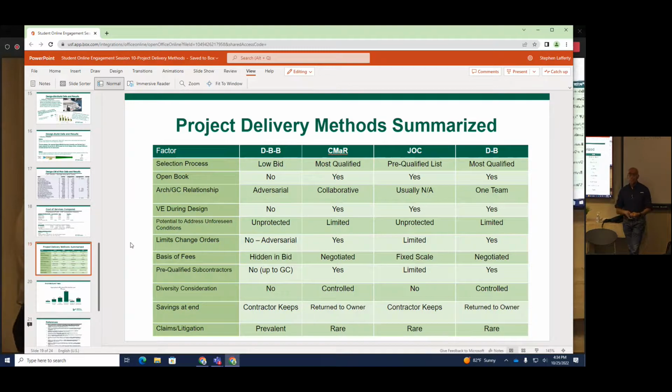Same thing with, say, certain Publixes, CVS or Walgreens. They're basically all the same type of design. Especially if you're building them from a prototype set of drawings where you've gone through a couple of projects, identified where the gaps are in the drawings, and fixed them, then you've got an almost perfect set of drawings that you can say, okay, this is exactly what I want, build this, and nobody has any questions, you can get the very best price.